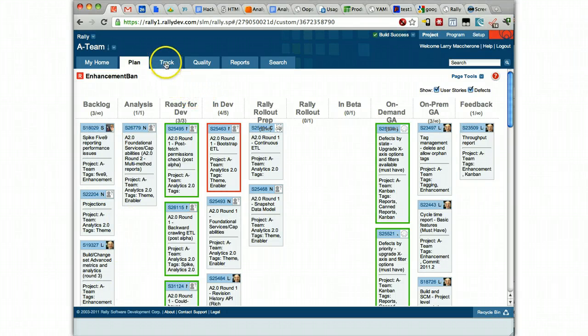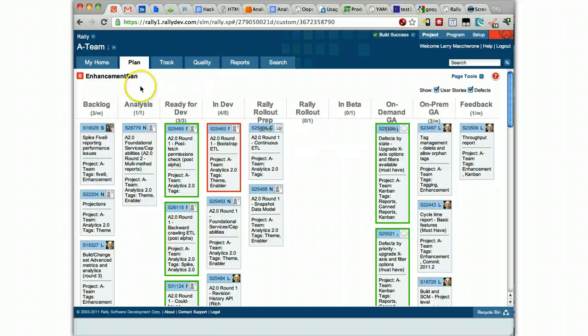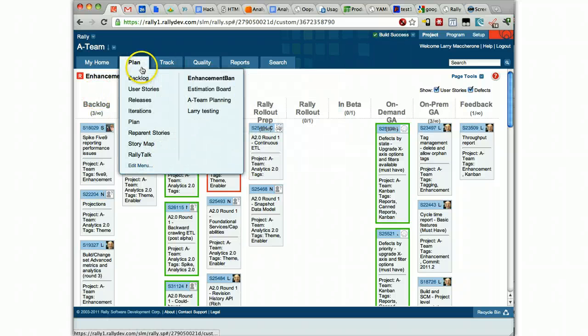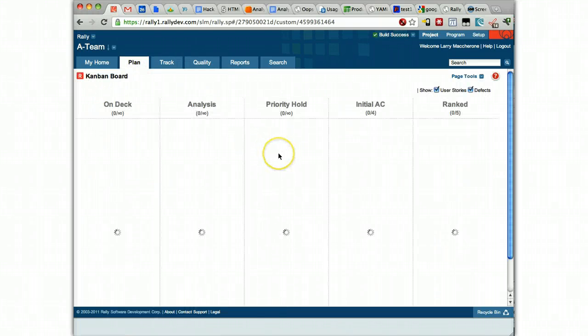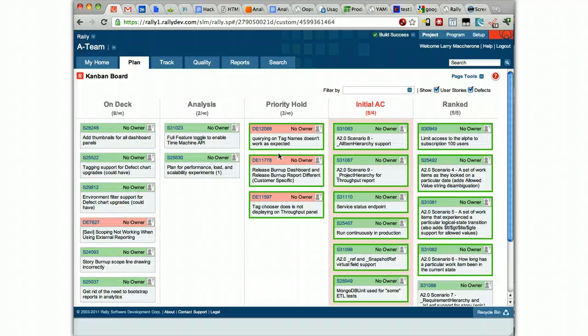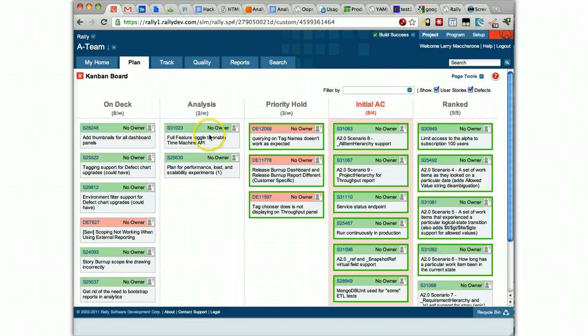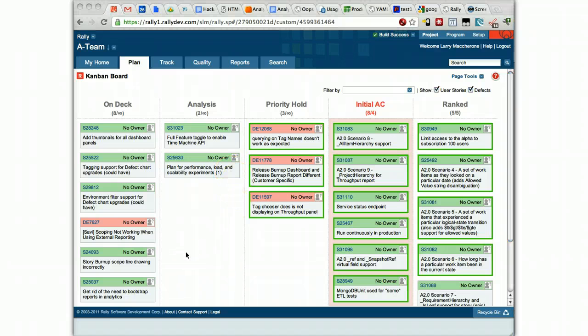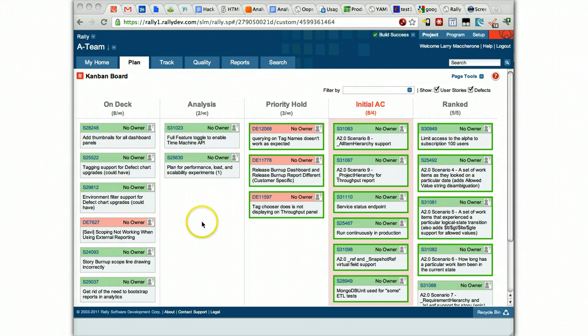There's another tool that I use for myself for planning to track these four columns myself to get ready for the team. So I have another board here that's at the same level as the team board. These two columns overlap with the team's process, but these three columns are not shown to the team. This is where I'm thinking. This is where me as a PO, I'm figuring out what the specs should be, what the acceptance criteria should be. So at the enhancement board level, I break down the stories, I decompose the enhancements down into stories that then show up on this board, typically first in this column.